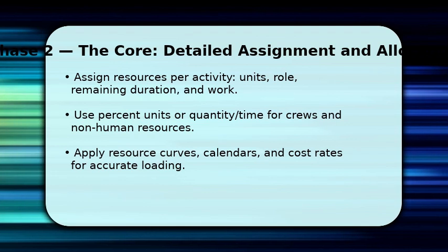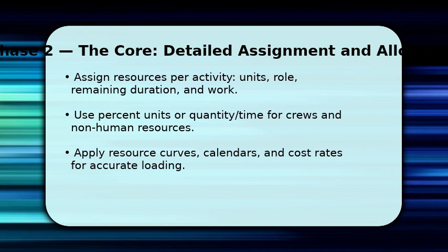Select activities and assign resources with the correct units and remaining duration so P6 calculates work accurately. Use percent units for people and quantity per time for crews or materials. This affects duration and cost.